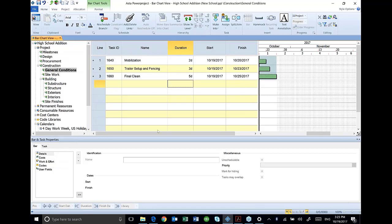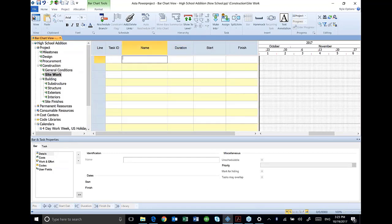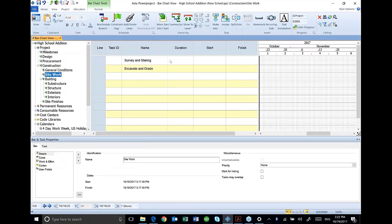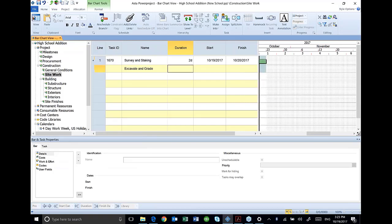Then under site work, survey and staking, excavate and grade. Kind of went out of order there, but there's my survey and staking. I've got two days there. For excavate and grade, I've got seven days.